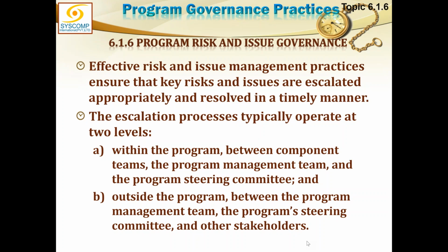If a risk happens, it doesn't remain a risk, it becomes an issue or a problem. Whatever the case is, whether it is still a risk or it has become an issue or a problem, in any case, whenever we know about it, we can escalate it to the next higher level, because the escalation path must have been defined.